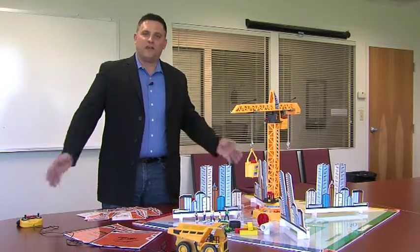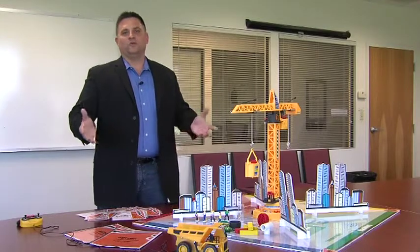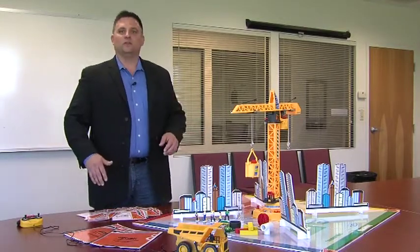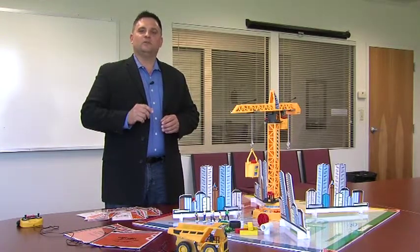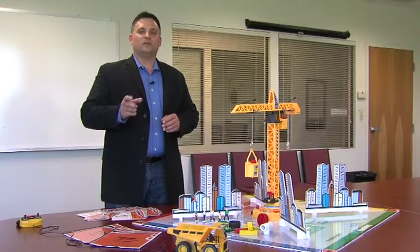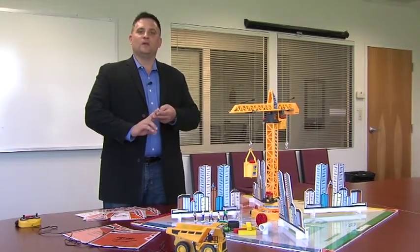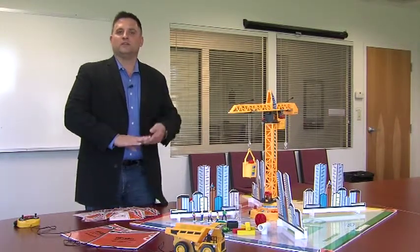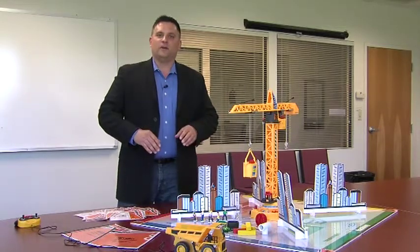And then we'll stop them and gather everybody around the whiteboard, and we'll brainstorm for a bit. What went good, what went bad, what could we do better in the future to make sure that the outage worked more smoothly. Then we'll stop the progress. We'll give them approximately 2 hours. And during that 2 hours, they'll take the lessons that we've taught them previously, concepts such as safety, risk management, maximization of resources, roles and responsibilities, single integrated plan, and they'll integrate those into the planning for their outage.